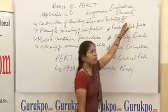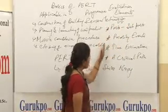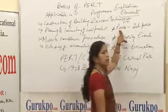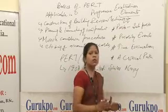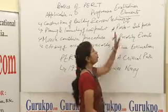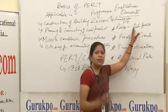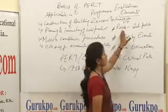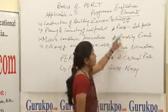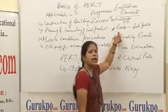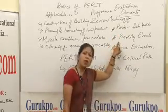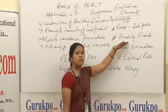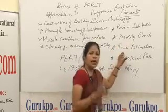If we want to understand the elements of PERT, some prominent procedures are followed. First, we dissect the whole project into activities and sub-activities so we can understand how many activities will be involved. Then we prioritize events — which is first and which is second. After prioritization, we estimate the time each activity will take to complete.